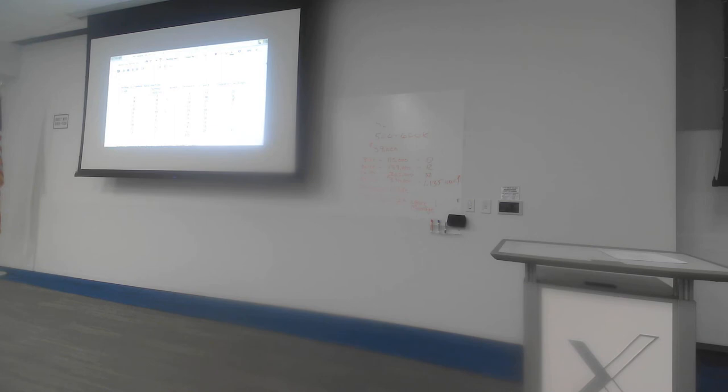Looking at the way that I can crash C, at the moment, the normal duration is 3 days. I can possibly crash it down to 2 days if I want. It has a normal cost of €10. The crash cost, if I was to crash it down to 2 days, is €13. So that's the next best activity that I can crash, and so let's go about it. Remember that I've only got 1 day to play with here.